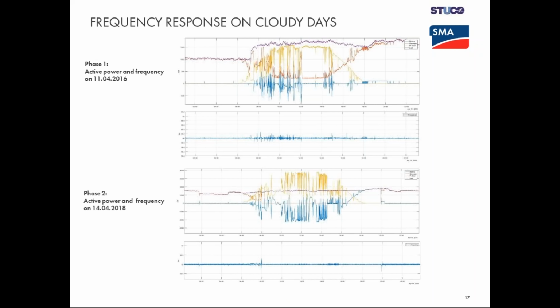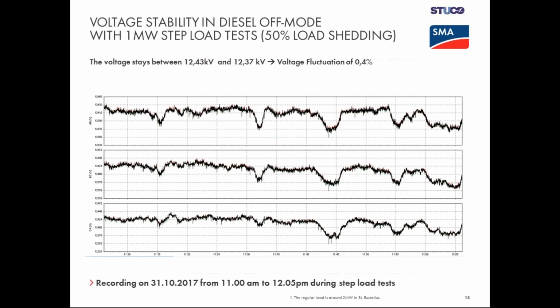Okay, now some more tests. Fred challenged the whole system, and he did not believe the paper, so he really did all these tests live on the island. I tell you, that was really interesting. And we had some sweating hands as well, but it worked out. So the first test was a step load test. 50% of the load, 1 megawatt, was just hard disconnected.